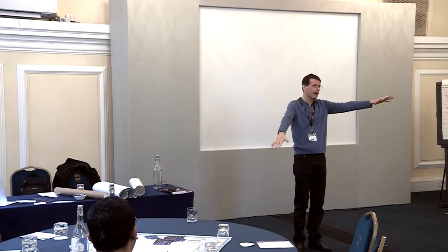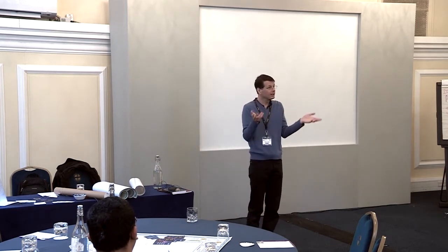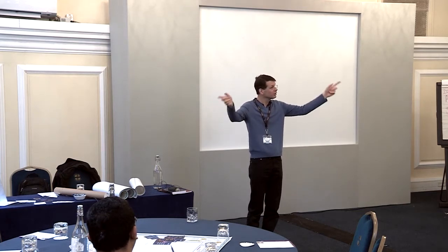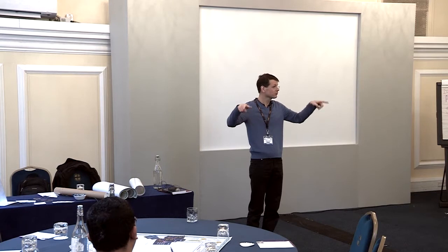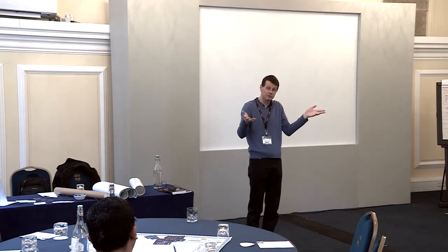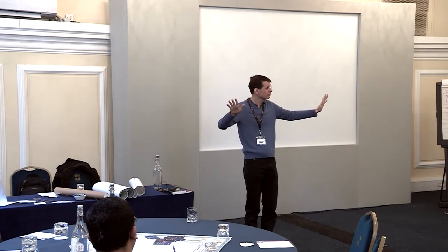So with these guys, with the BAs, when we split them up, we end up with the developers on one sheet, and the BAs and the testers on another. And afterwards, the BAs and the testers said it was so good because we got to talk about our issues, not the developer issues. For once, we were able to talk about the problems we face. Interestingly, although the 2 teams had talked about different issues, they came to the same conclusions, that part of the interface of the team needed to change. It's kind of interesting. And that same technique also works where you've got distributed teams.